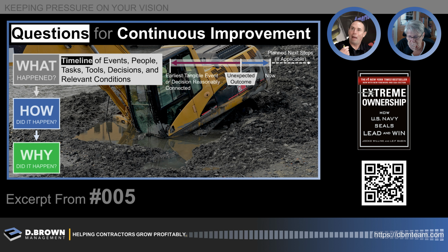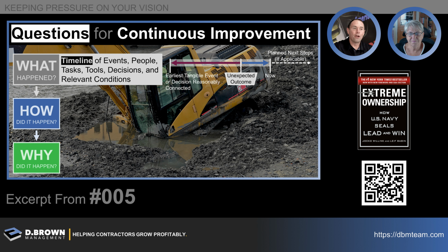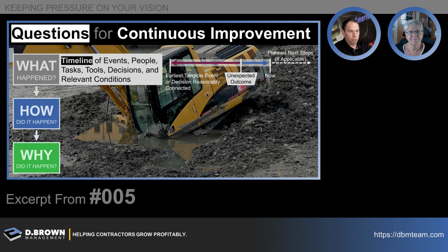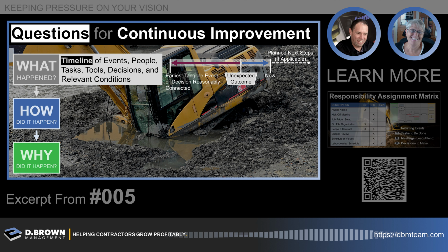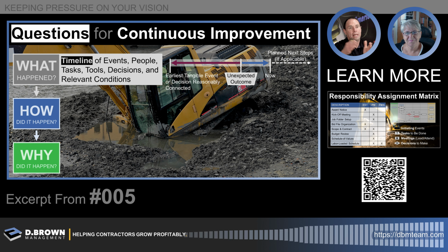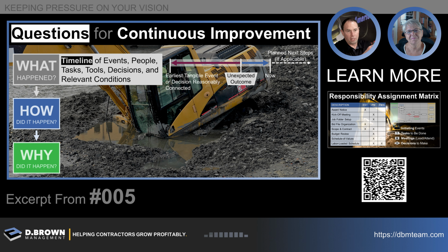When we actually tracked it back, once we got past the emotion, and that took a while, it was because there was one small change made in the procedures, to level workflow. We reallocated a task from this crew to this crew, but we only told one crew. There were several crews doing these two different tasks, and we just didn't tell all the crews exactly what the change was, that we reallocated this task from this to this, and so they had a mess up on it, and that was it.